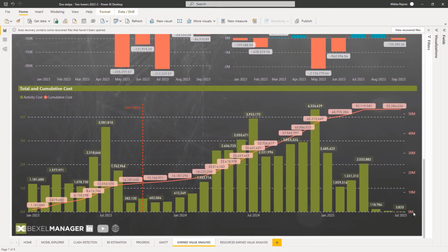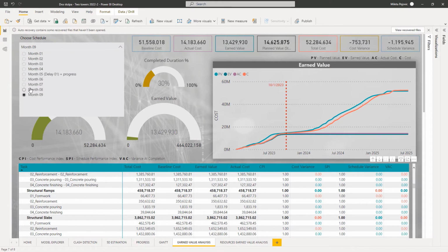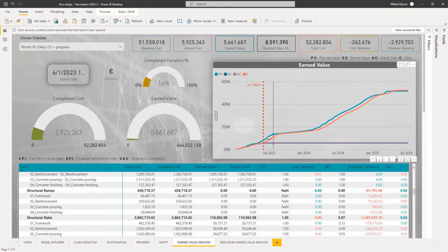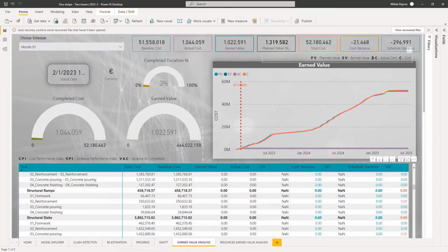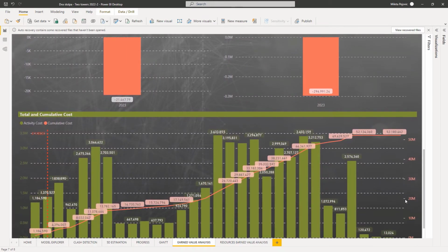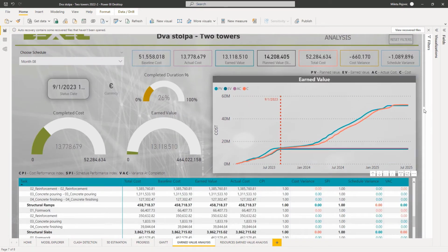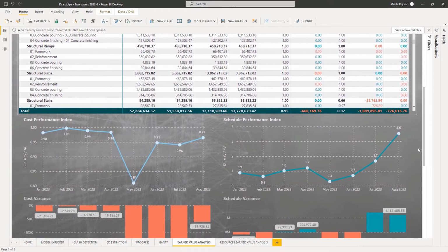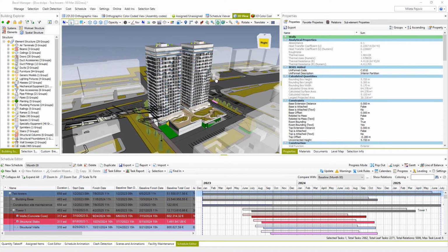Good thing is that here we have a history of all progress entries, so risk managers could analyze and anticipate potential issues on the project and save all this information as evidence if needed. In this example, we identify a notable delay during the 5th month due to extensive design changes requested by the client. That delay was later decreased, but after 9 months of construction progress, we are still in delay caused partially by this event. By changing compare schedules, earned value chart and all other information is updated instantly. And this is a good way to track the history of your project and project cost.